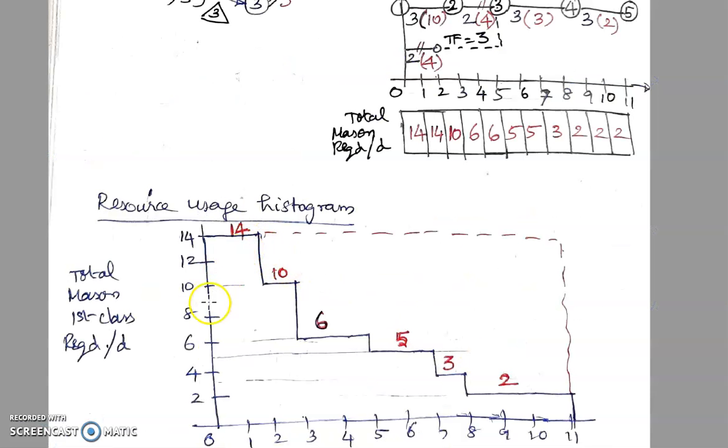We can see that there is a huge requirement for resource in the initial period. So this is our peak zone. Therefore we have to identify the non-critical activities in this peak zone and shift them to the right side, because that is the zone where we have non-peak, our minimum demand. So from the maximum demand zone, we pick out the activities which are non-critical and shift them by their float values out of the peak zone.